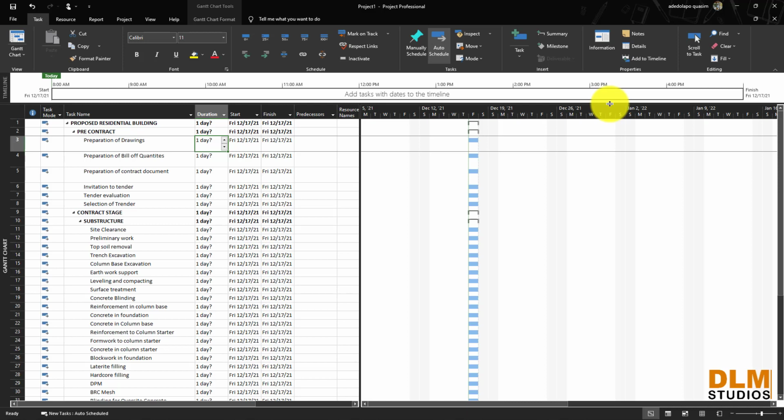So you can increase the number of laborers. Two people will cover 20, four people on site will cover more. So you increase the number of laborers to reduce the time duration. That's how you can do that work. You can do it on average for like 3 different projects, so you get an average duration of each project. You can do that at your own leisure. Also, people that want to know more on that, you can always reach out to me and I'll explain better to you on that.